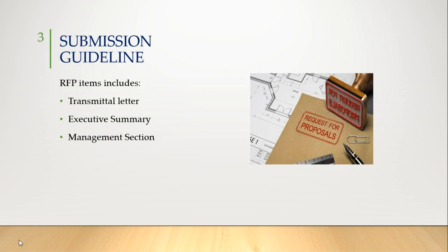The transmitter letter shall include an identification number in a bold text, and in the body of the letter, the supplier shall explain their proposal in a concise manner and include the names and contacts of the authorized individuals to negotiate on behalf of the company. Moreover, the supplier shall state when the company is ready to begin operations and provide a date of expiration valid for the proposal.